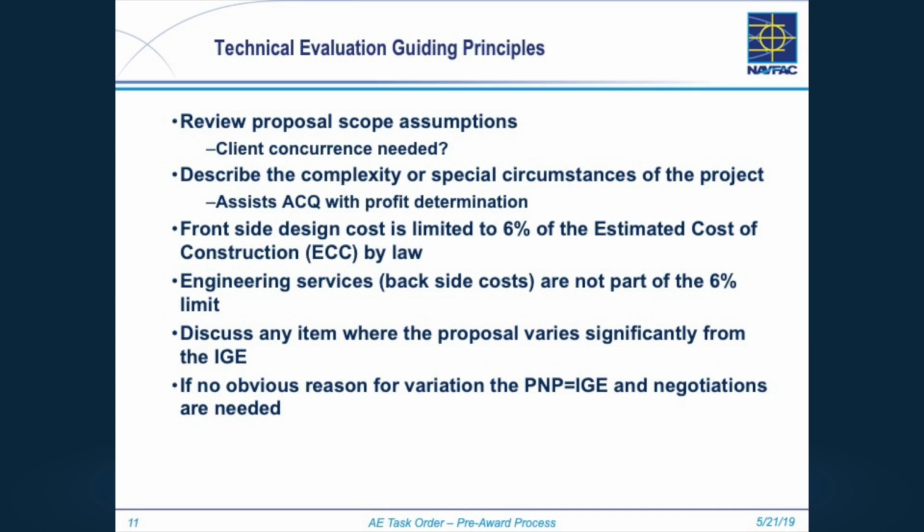The acquisitions people also need you to tell them in your evaluation about any special considerations for this project or any complexity so that they know how to do the profit determination. You know, is there a reason that we should pay more profit because there's some complexity or there's some special circumstance? We already talked about front side, back side. Your tech evaluation, this is the key. You discuss any item where the proposal varies significantly from the IGE.